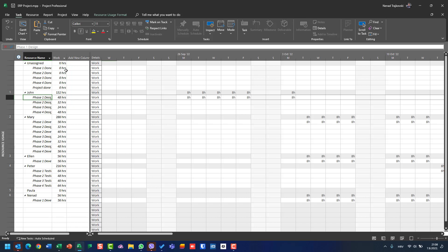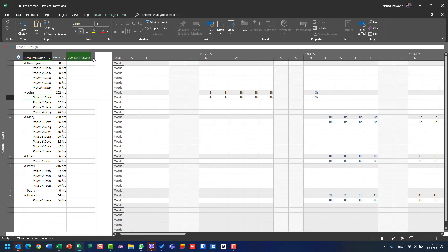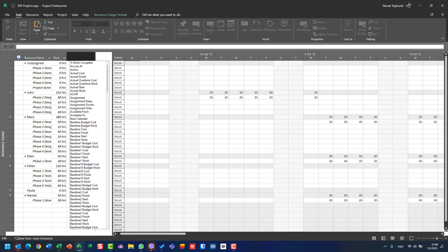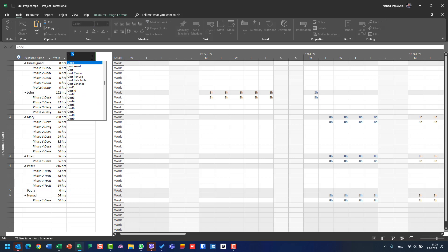In Task Usage view I had tasks, and under each task I had resources. Here in Resource Usage view, I can see a resource and all tasks which belong to that resource. I can also see work and the resource name. I can add a column — yes, I can put Cost here.